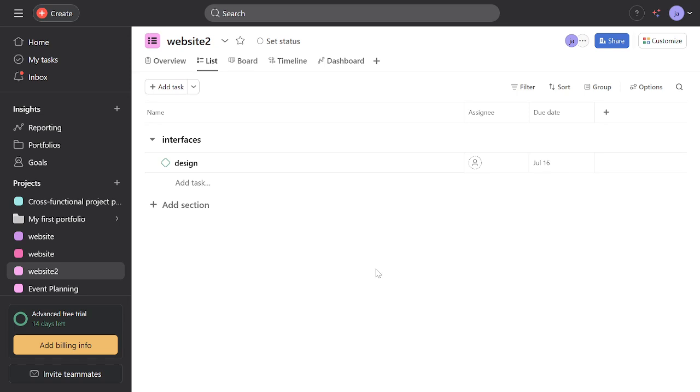Next, we want to determine the duration for each milestone. This helps us by giving a realistic view of how long each segment of the project will take. It's important to combine team input and historical data for an accurate estimation.